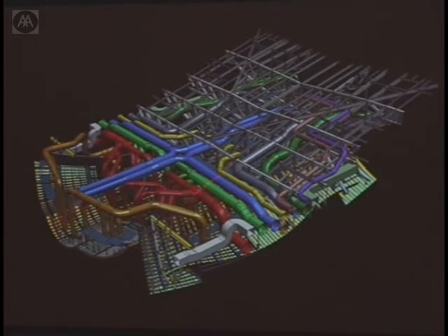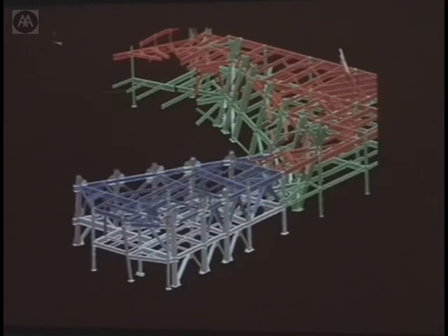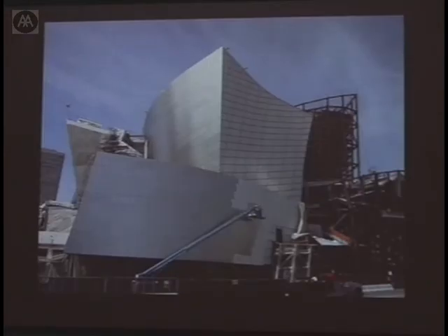So if the fabricator of the HVAC system, the guy who folds the sheet metal, gets it wrong, then you've got a serious problem on site. You're going to have stoppage, you might have to take something apart. So the only way to do this really is to have a fully coordinated model that people abide by. This also helps obviously when you have sub-steel packages that you give out to different steel fabricators and different steel detailers.